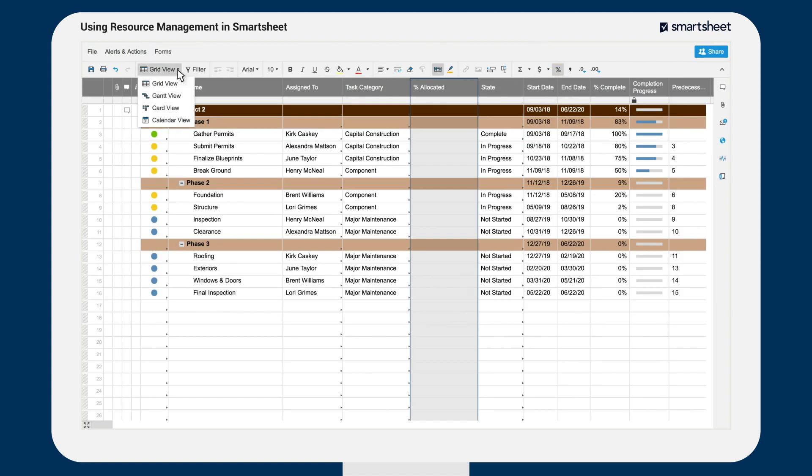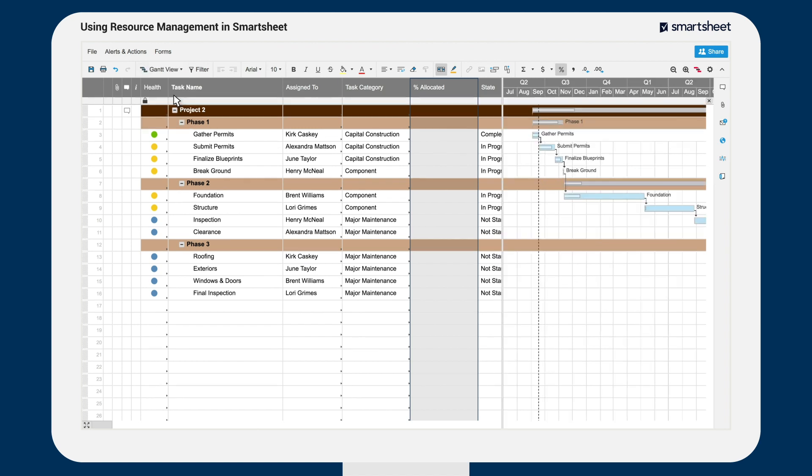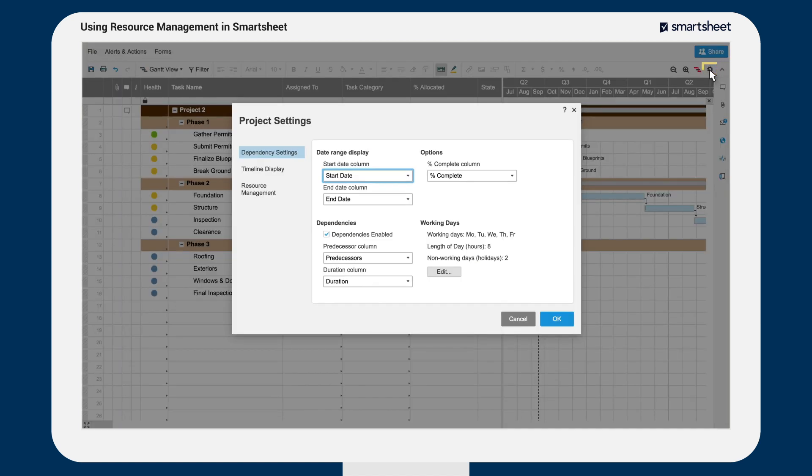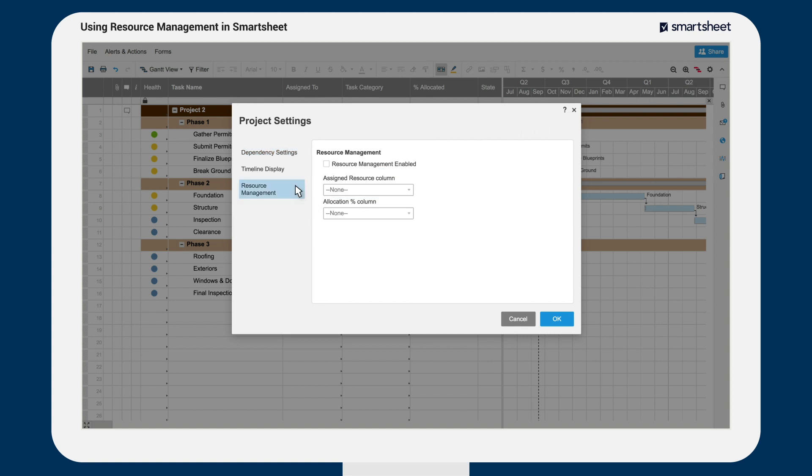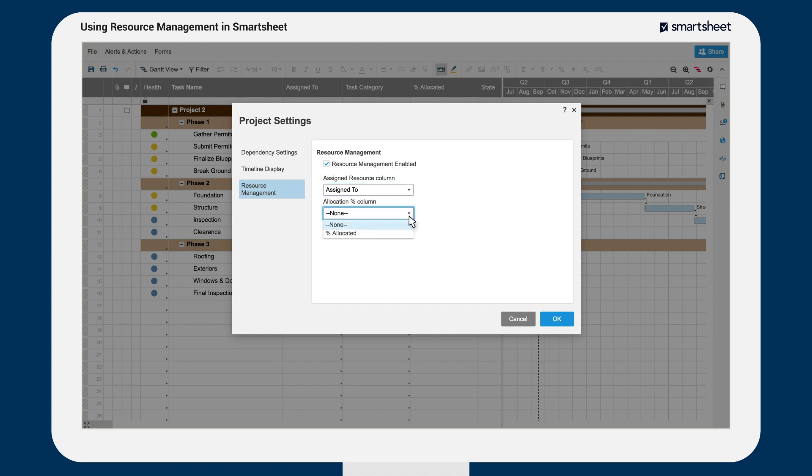Next, click on the Gantt settings icon and verify that dependencies are enabled. Then, enable resource management on the sheet and select the column that contains your resources as well as your allocation percent column.